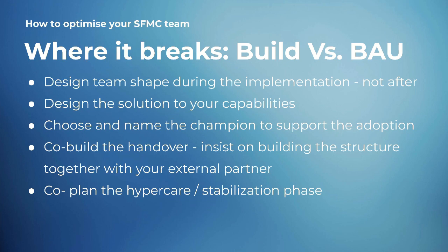Plan it together with your partner closely: the structure, the timeline, the team that is participating from your side, the team that is shadowing the partner, and also co-plan the hypercare phase. That's the most critical phase, when the go-live happens.